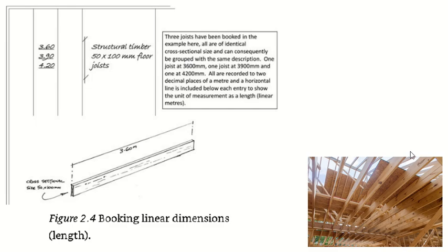Now you see here we have 3 linear dimensions. Why am I saying 3 linear? Why not cubic meter? How do I know it's 3 linear? Because of the line. We see three of them, and you can see the item here in the description. It's a structured timber floor joist. What is the joist? This bar, the support structure. A joist is a wooden bar like this.